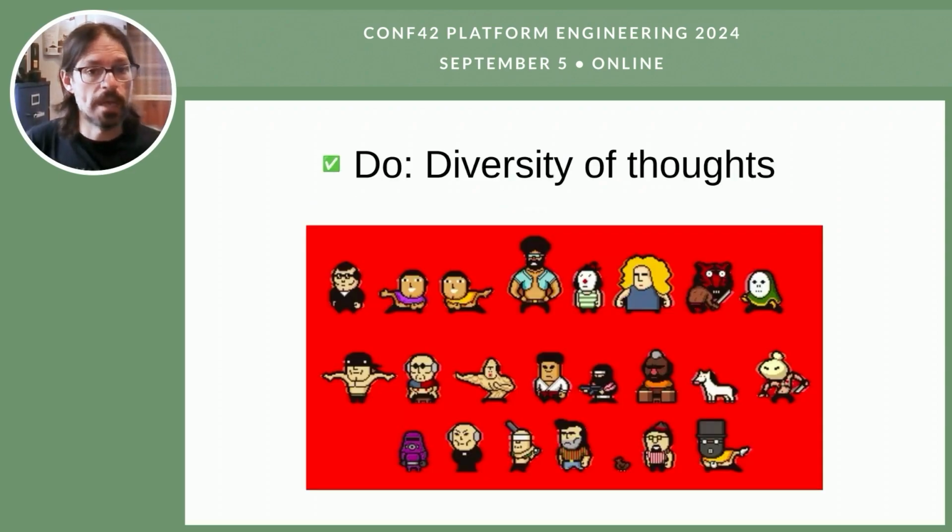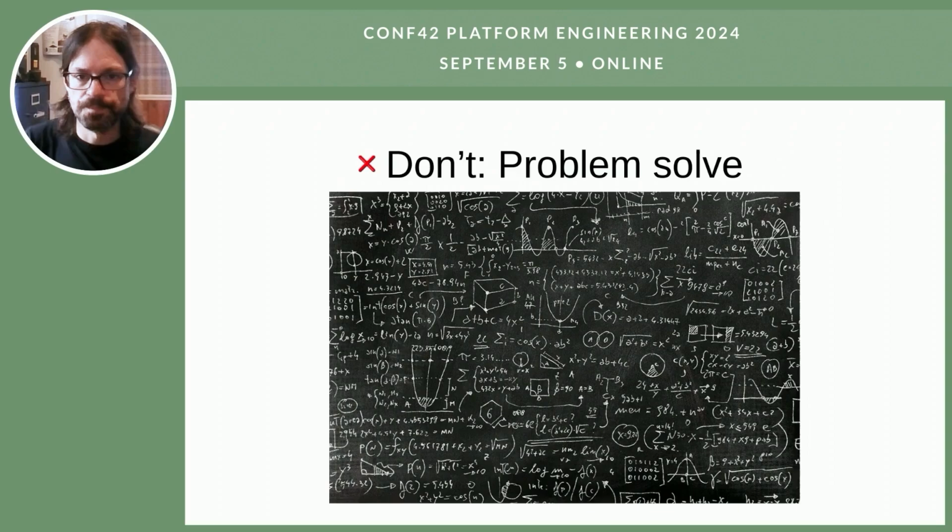That said, you also want to have diversity of thought. So you don't want to have only three DevOps engineers doing that exercise because they will most likely all have the same perspective. You will get fewer ideas. So again, similar to when you do brainstorming, you want to have diversity of thought. So different people, not too many, but different people, different backgrounds, different parts of the company, as long as they are relevant to the project. So you could have a project manager, you could have a salesperson potentially, you could have an engineer, different people in engineering, depending on what you are doing in the project. Try to have a variety so you get diversity of views.